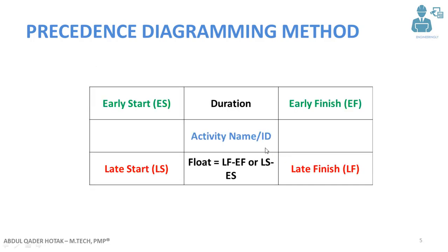In PDM, we show each activity in a node. We have the activity name or ID, the early start (the earliest possible we can start the activity), the early finish (the earliest we can finish the activity), and the duration in the middle. We also have the late start (the activity could be started no later than this date), the late finish, and the float. The formula for float is: late finish minus early finish, or late start minus early start. Early finish is calculated by adding the duration plus the early start value.